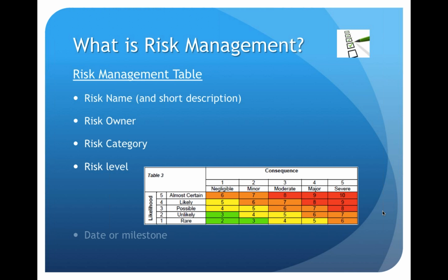Also important is something called the risk level. The risk level is basically the summarized information for the importance of the risk, how important it is for the company and for everyone at this point. It's usually calculated by some sort of weighing between the likelihood of the risk materializing and the consequence of that risk materializing, what it would actually do to the system.